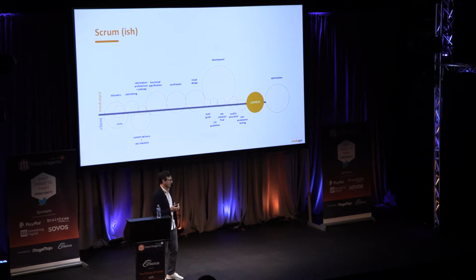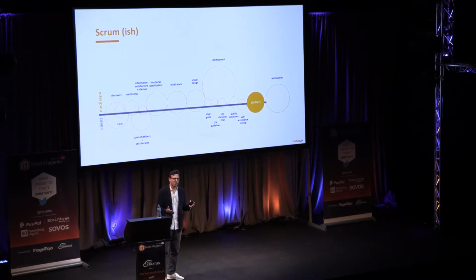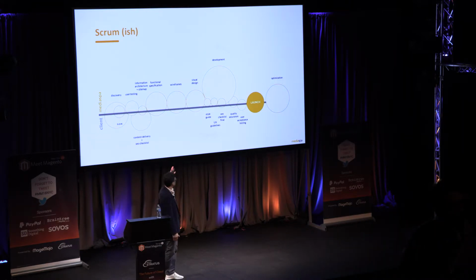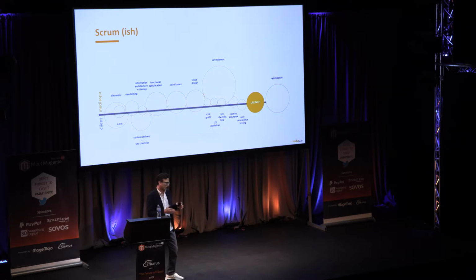Now, our merchant, in this case a very shrewd individual who would have called this out if we didn't call it out for him, is not going to want to pay 35 hours of QA to do partial end-to-end testing when 2 weeks later we can test the entire system. So that's a situation where we are not going to do a full Agile or Scrum cycle, and we're going to cut that off because we know after the next launch, we'll be able to do end-to-end testing. And that's something that's appreciated and really drives ROI.